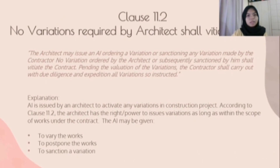Next, Clause 11.2 - No variation required by the architect should void the contract. An AI is issued by an architect to activate any variation in a construction project. The architect has the right and power to issue a variation as long as it is within the scope of work under the contract. The AI may be given to vary the works, to postpone the works, or to sanction a variation.